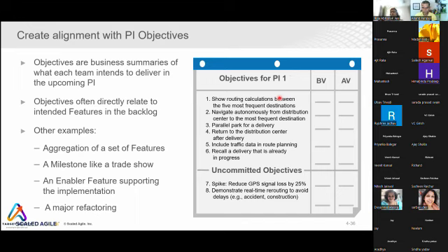When we are doing the backlog refinement in the IP notion, can we do it, or is there any other separate one? Backlog refinement happens throughout the iterations, throughout the PI. So there is no schedule for that. Anytime, anywhere, and any number of frequency, whatever is required, you can do the backlog refinement. Okay, it's a continuous process. Okay, got it.